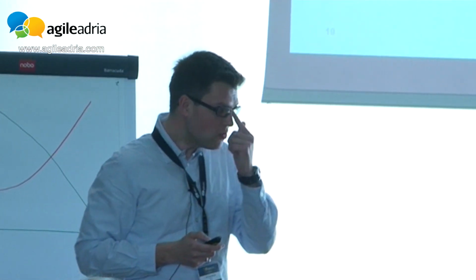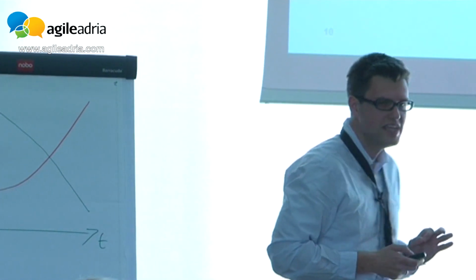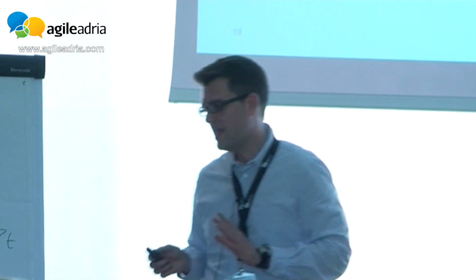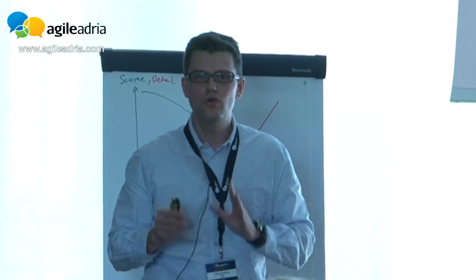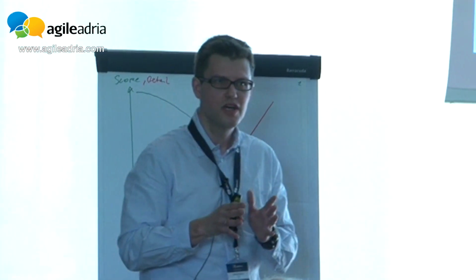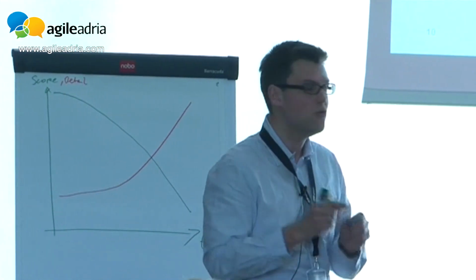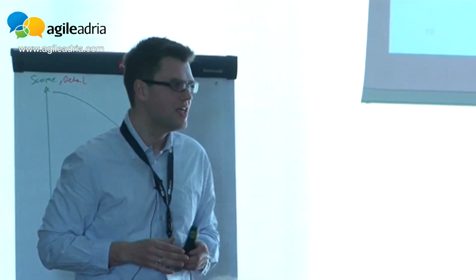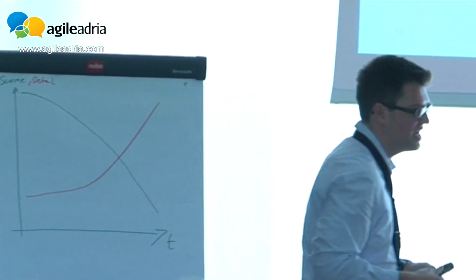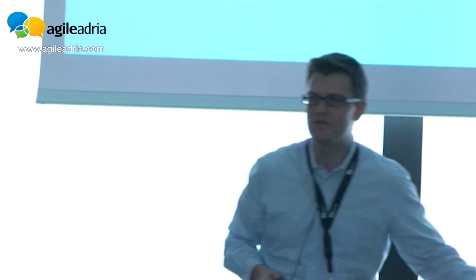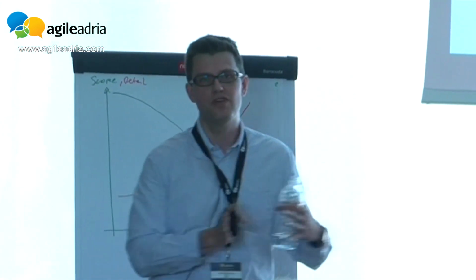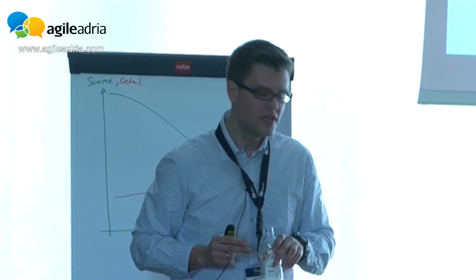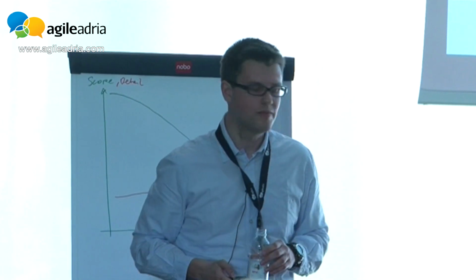And what impact mapping does is it tries to figure out who can help you with this goal, or who can obstruct you with this goal. Who can you address and who can you impact in order to achieve the goal you have? Like if I want to sell books, I should think of who would be my customers, which I want to impact with my system, whose behavior I want to change in order that I succeed with my goal.